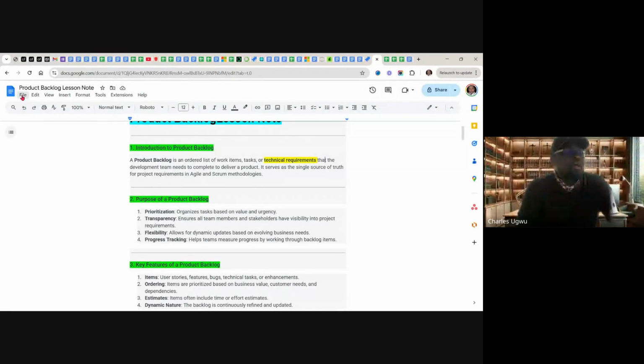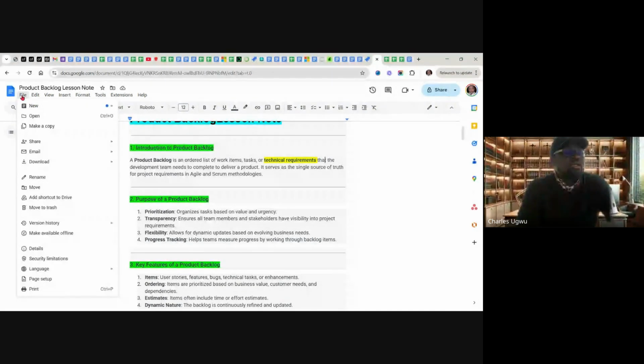And if you want to break it down more, if I click on this, it will open up and you see so many other features. Because this is a product, File is a feature and it's too big, so we can call it an epic, because there are so many features in this file. To decompose it, we can say let File become an epic, and New and Open become features under this epic.